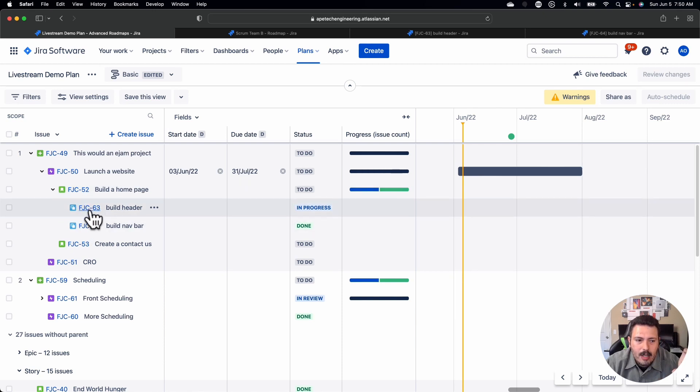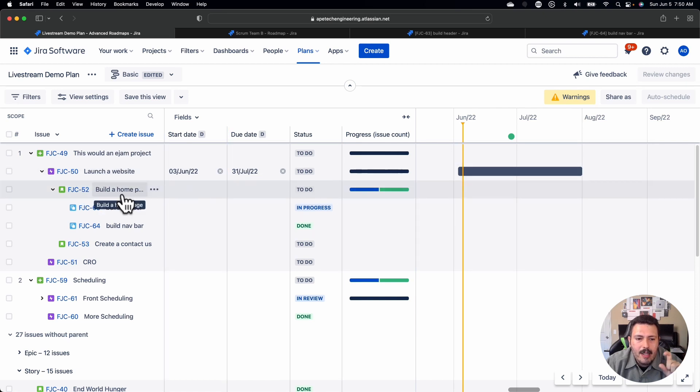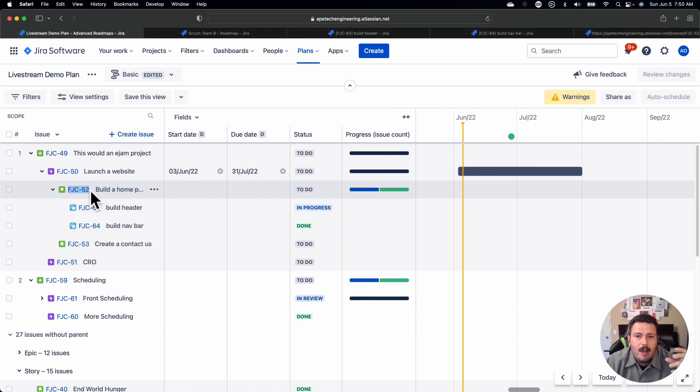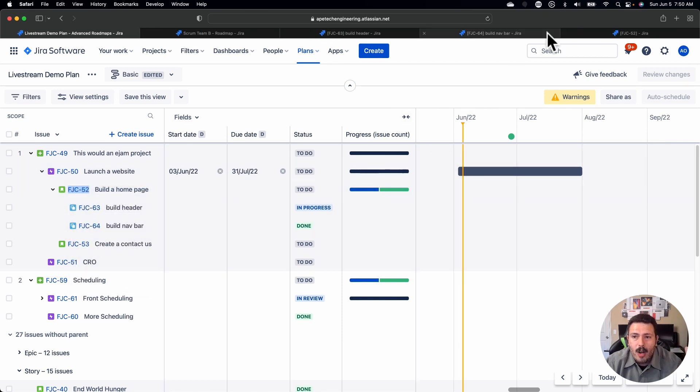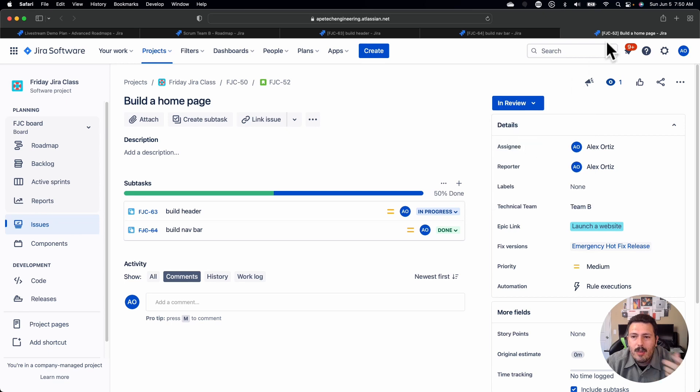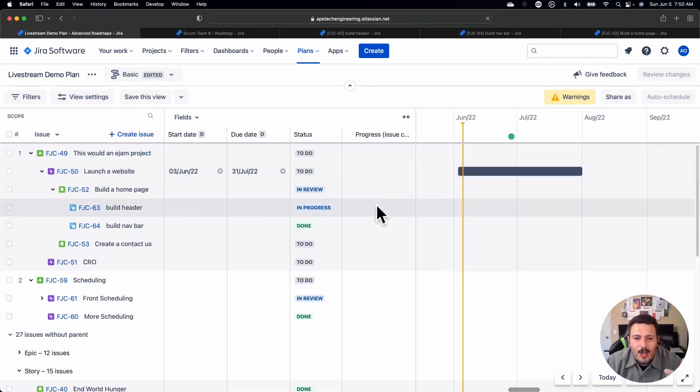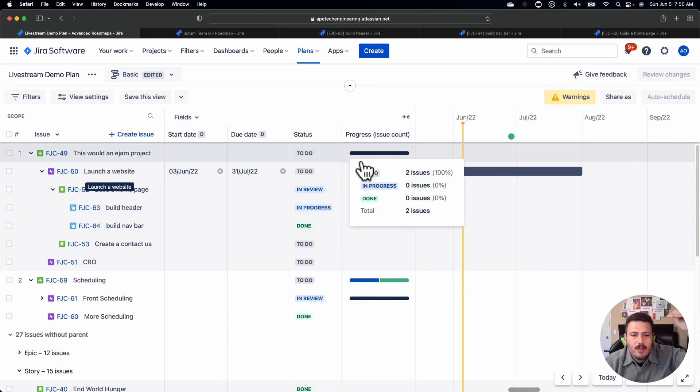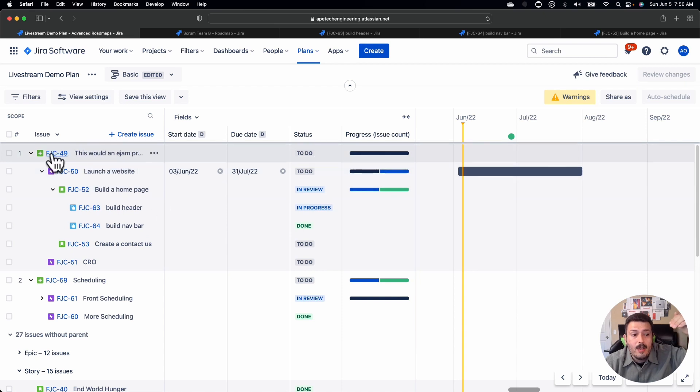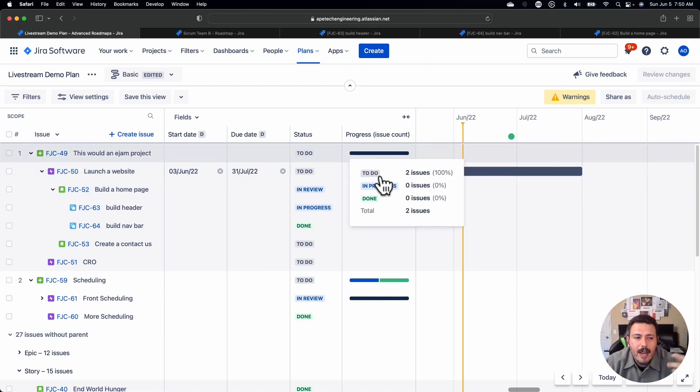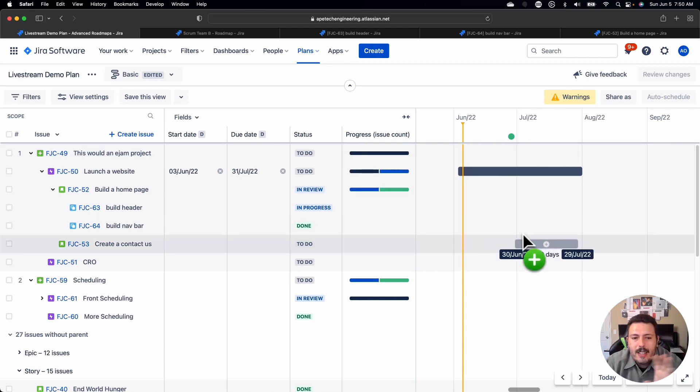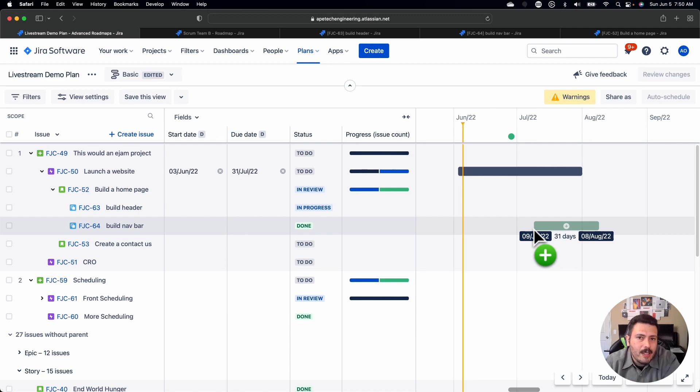When I come back into my advanced roadmap, I'm getting another quick refresh, you'll notice that this story has been updated. So these two subtasks now have updated this story. But because the story didn't get updated, again, you can maybe go look at some automation rules to make this more automated. But for now, manually, I'm going to put this one in review. None of this has to make sense other than I just want to show you that as the children get updated, the parent, whether it's the story or the epic, or even if you have issues above the epic, those will automatically be showing you the overall progress for free without any additional overhead, just by your team actually just updating their statuses.